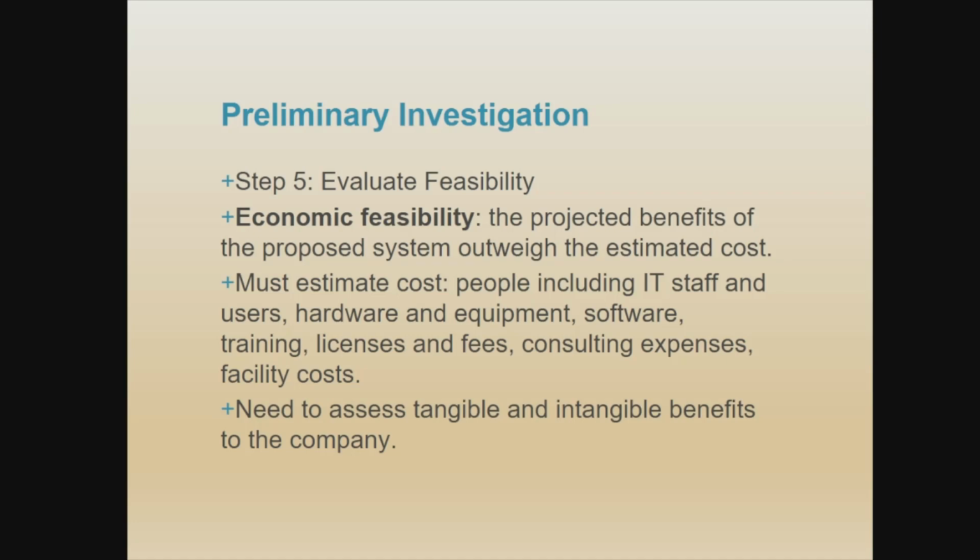So, do the projected benefits of the proposed system outweigh the estimated cost in terms of the financial? Okay, you need to estimate the cost: people including the IT staff and the users of the system, the hardware and the equipment required, the software, the training, the license, the services, the fees, the maintenance, the consulting expenses, and the facilities cost.